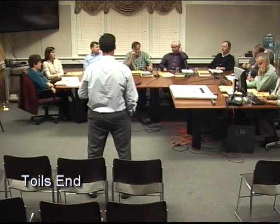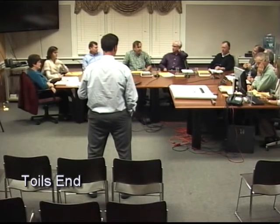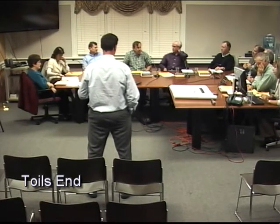There's a question. Andrea, well, we had the meeting with the Pulte folks, and Tom Houston attended, and Ray. What was explained to them is that doing the study now under current conditions is different than what was done before, although they still wanted that drainage study. Right now, we have the installation of all of the driveways with a steep pitch running into the waterway. We have front yards with a steep pitch that act as half as pervious as a driveway, with sheets of runoff. So all of this now has to be taken into account since we have actual conditions with the new study. Tom Rizzotti, their engineer, still wanted the old study as a guide to go by, but when we were speaking at that meeting, we all were informing him of the other details that are going to have to be taken into this new study that wasn't done in the old study because it wasn't built out.